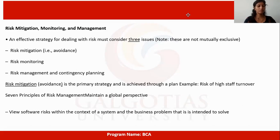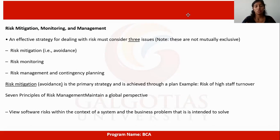Risk mitigation, monitoring, and management: an effective strategy for dealing with risk must consider three issues, which are not mutually exclusive — risk mitigation, which means avoiding the risk; risk monitoring; and risk management and contingency planning. Risk mitigation is the primary strategy and is achieved through a plan — for example, addressing the risk of high staff turnover.